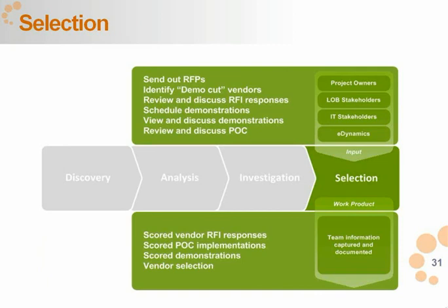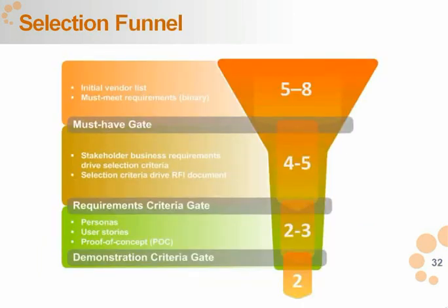And this is where what we've put into play theoretically actually makes its way to practice, because typically in a demonstration we give vendors a 2+ hour window of time. We'll ask them specifically to focus on perhaps some of our POC requirements, proof of concept requirements that we've laid out, and if they've built a proof of concept, some of the demo points that we want to cover, and then they have a chance to have a free-form demo, show what's hot with their product.